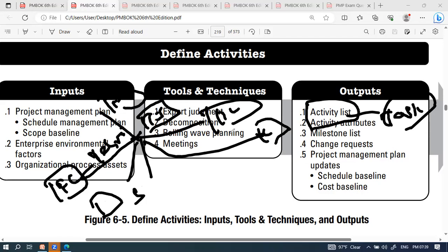Now, to bring a Saravana Bhavan, you need to know all the tasks you need to perform. Saravana Bhavan is a minor deliverable, and you need to define the tasks under this deliverable. What tasks do our people have to do? They have to do the civil work, the mechanical work, the electrical work, plumbing work, testing and commissioning, and the civil defense work to build this Saravana Bhavan. Once they have built it, this deliverable is ready to go to the customer, right or not? Is everyone able to understand?